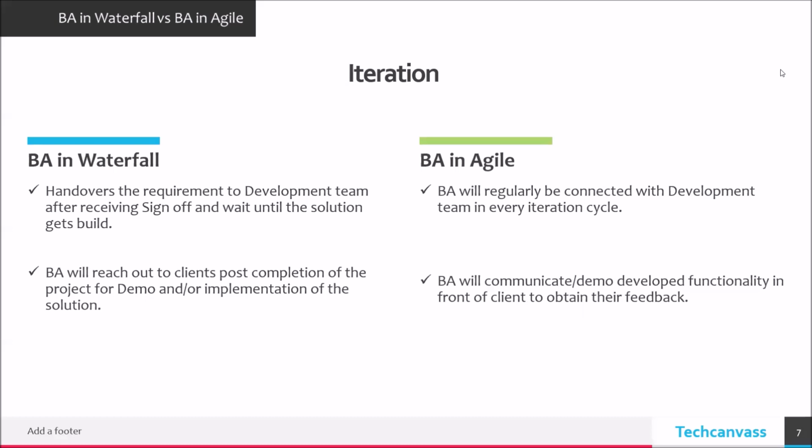Agile iterations are different. Agile iteration is a short 1 to 2 week period, ideally, where a team takes a couple of their customers' most important user stories and build them completely as a running tested software. Business analysts will demo, communicate, educate client to use these time-box delivery running tested softwares and will take feedback and move further. How iteration helps, let's talk in the next slide.